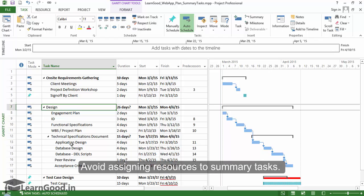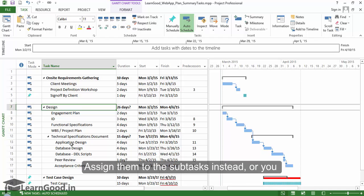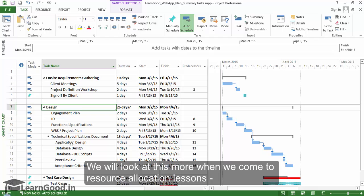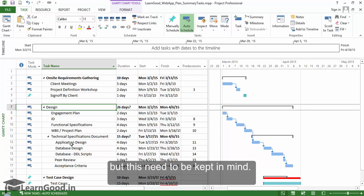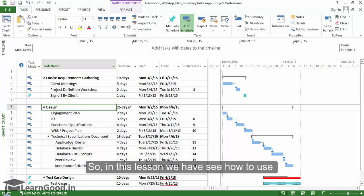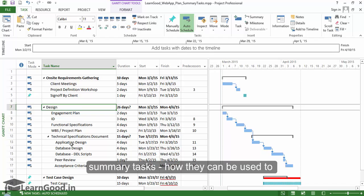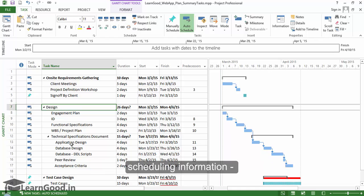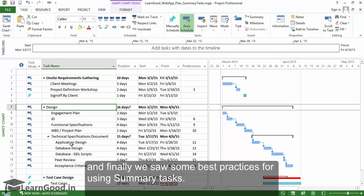Avoid assigning resources to summary tasks. Assign them to subtasks inside, or you might not be able to resolve over-allocations. We will look at this more when we come to resource allocation lessons, but keep this in mind. So in this lesson we have seen how to use summary tasks, how they can be used to organize tasks visually, hold additional scheduling information, and finally we saw some best practices for using summary tasks.